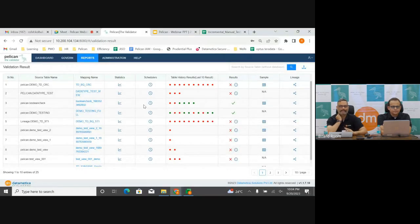This makes it clean and simpler, and you are able to time-box it rather than making it unpredictable, bringing risk, and bringing cross-functional teams into play, which makes the entire program unpredictable. So, Binoy, to answer your question, lift and shift is the way to go for the data model. The rest of the technology is getting modernized. Use outcome-based validation.